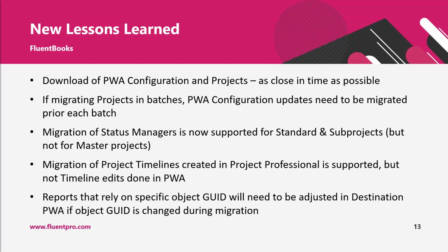So if reports rely not on display name or task name or project name, but if they rely on object GUID, these reports will need to be revised and adjusted either during test migration or as a post-migration activity.